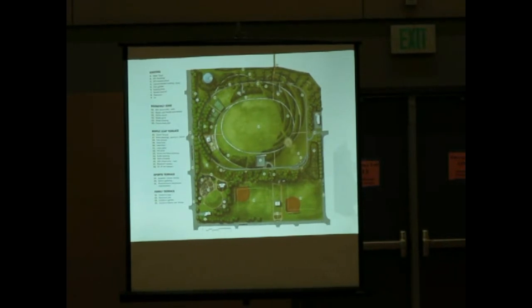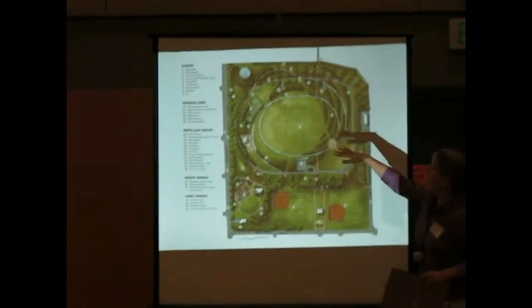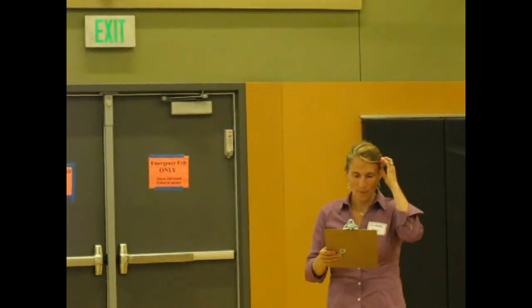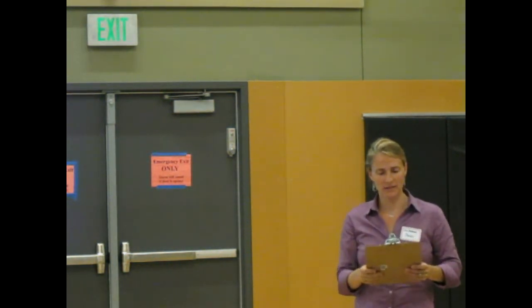This is a nice backdrop for the next few minutes as I talk about the full reservoir. I'm going to start with an update from Stephanie Murphy, a project manager for the Reservoir Burial Project. The park in general has $5 million from the Parks and Green Spaces levy. Anyhow, the reservoir structure is scheduled to be complete in September of 2011. And that's the literal concrete cell structure itself. And then in October of this year, they're going to start backfilling.